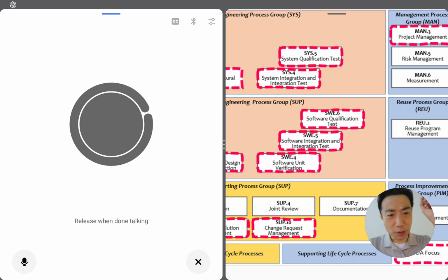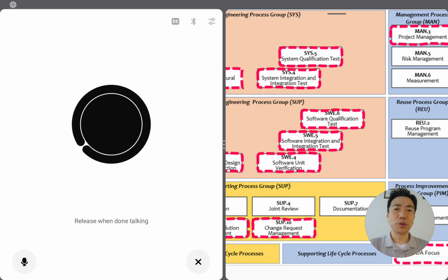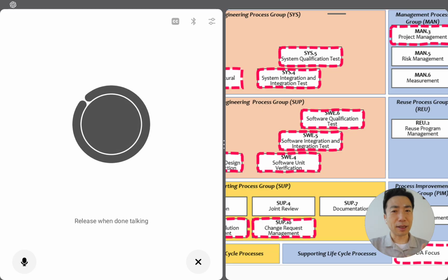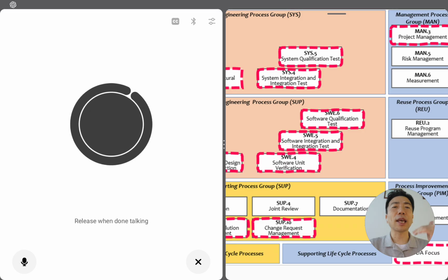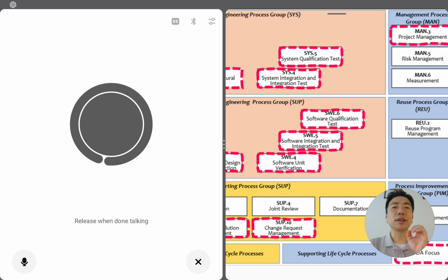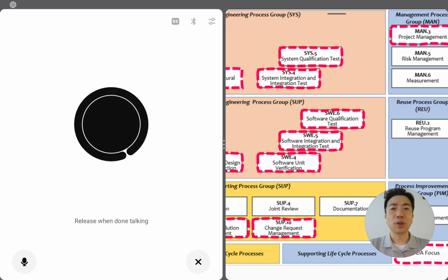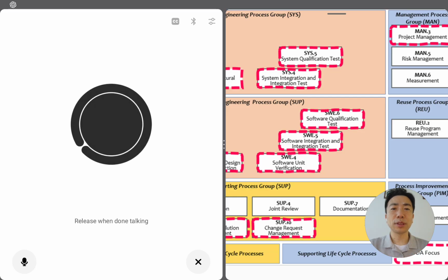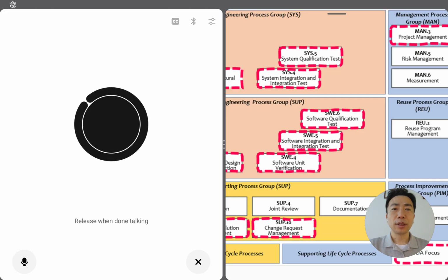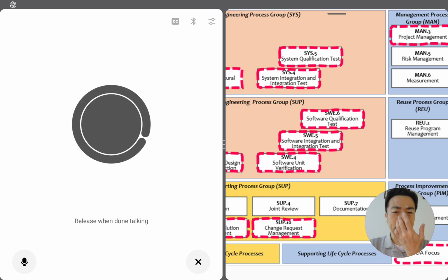Okay, I got it. Here I go. Let's get started. I can think of this as 4 steps. Number one, request it. Someone sees the need for a change and creates a change request (CR). Number two, validate it. The CCB, change control board, reviews it, checking cost, schedule, quality impact, and risk.